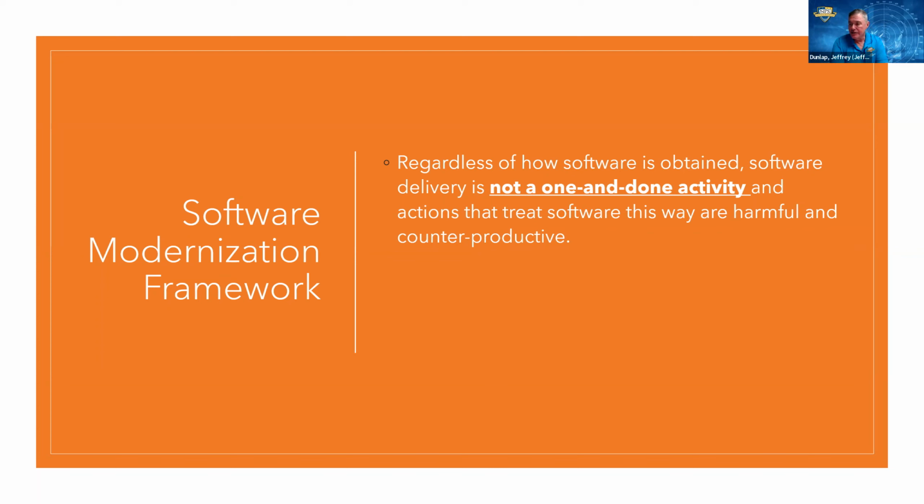And actually, in reality, it's never done, even in today's environment, right? As soon as we finish the software, or at least from our perspective, we finish the capabilities and we have operational tests and we get all the certifications, we usually hand it over to a software support agent, an SSA. The software support agent is going to make sure that the cyber vulnerabilities are addressed, and any deficiencies are corrected if they're high enough priority. We've always supported the software throughout its life cycle to where it ultimately is disposed of and replaced with something else. So we've always had the conceptual cradle to grave.